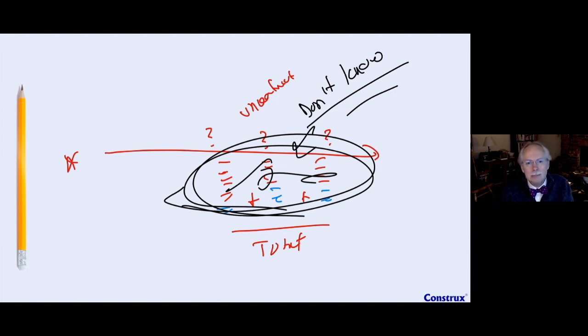And rather than that, let's base the estimate only on things that we know at this point, which is we're going to have this work, and this work is similar to work we did last year that was roughly the same size. And that took a certain amount of time. So we suspect it'll be around the same size again until we learn more.